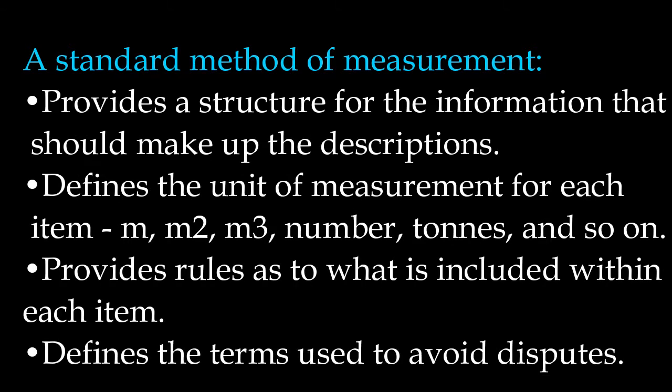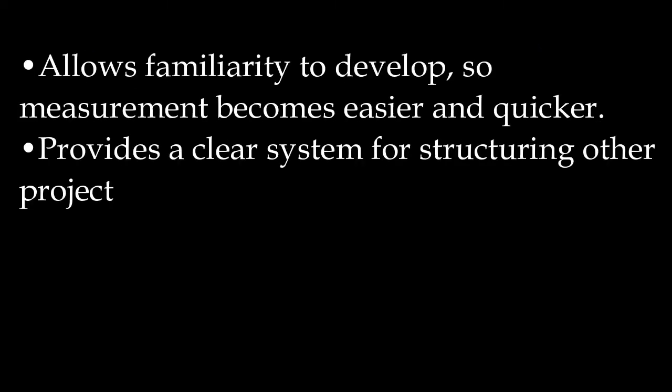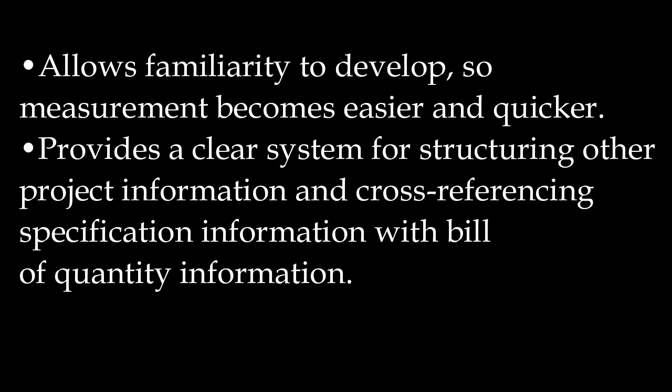A standard method of measurement provides a structure for the information that should make up the descriptions. It defines the unit of measurement for each item — m, metre squared, metre cubed, number, tons, and so on. It provides rules as to what is included within each item. It defines the terms used to avoid disputes. It allows familiarity to develop, so measurement becomes easier and quicker. It provides a clear system for structuring other project information and cross-referencing specification information with bill of quantity information.